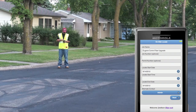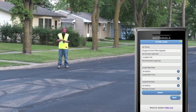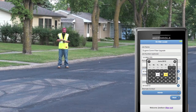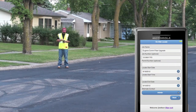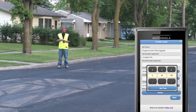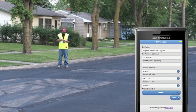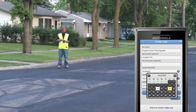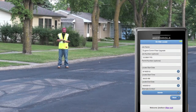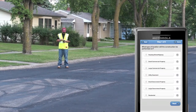Key project information includes the project name, project number, date construction will start, or date locates are needed by, the time the project will start — in case it will be a non-standard time like night work — when it will end, and who the alternate contact should be in case I can't be reached.